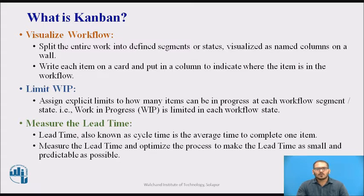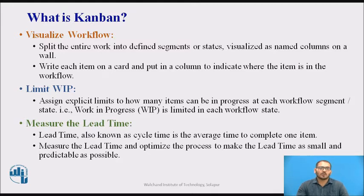Visualize the workflow: it splits the entire work into defined segments or states, visualized as named columns on a wall. Write each item on a card and put it in a column to indicate where the item is in the workflow.